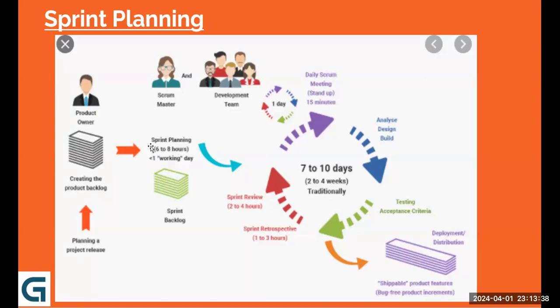If it is a 4 week long sprint, how long should the sprint planning meeting go? 6 to 8 hours. 6 to 8 hours. Brilliant. Yes, so that is one full day. So if it is 4 weeks, then what happens? You start implementing because you have the clarity.